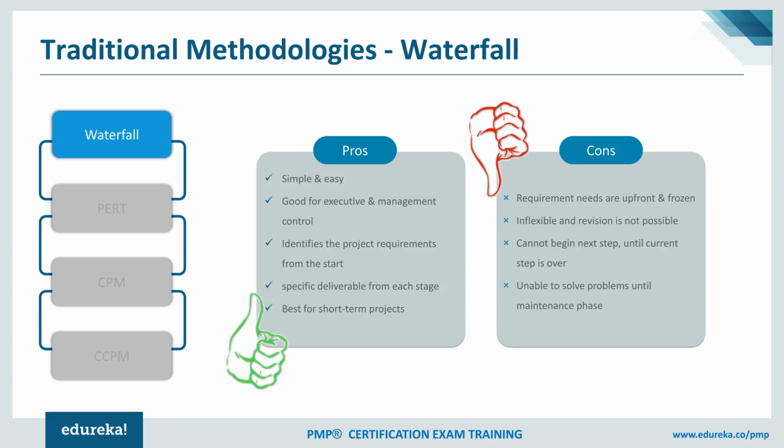Waterfall methodology could be applied to projects where things are known upfront. So if you think that you know everything about the project in terms of requirements, very few changes are expected, the duration of the project is short, and the complexity is not as high. For example, evergreening projects or migration projects, wherein things are pretty much clear in terms of what exactly you are migrating and where exactly you are migrating. From a technology and requirements point of view, if things are known, that's where the waterfall methodology could be used. I hope this clarifies your question.